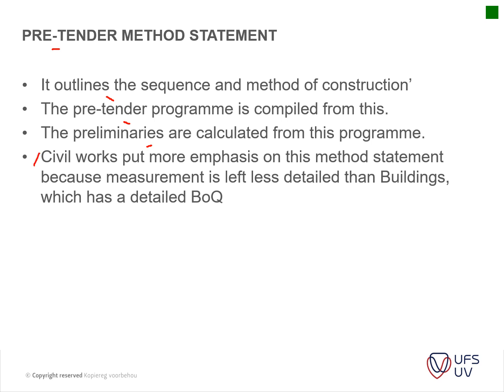If you're working on civil or SANS measurement BOQs, the detail of the descriptions in your actual BOQ will be different than your standard system that you will get. So you will have to spend a bit more time on actually measuring some of the work yourself as a contractor.